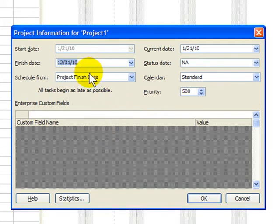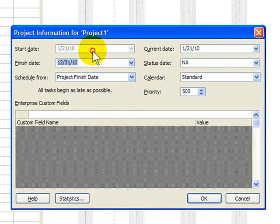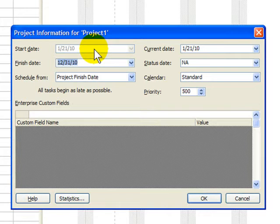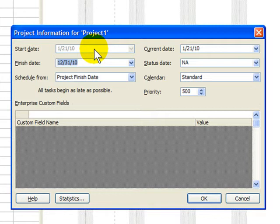Once you've chosen project finish date, you cannot input the project start date. But some people like to think backwards. The difficulty with this decision is that when you do that, every task will not start as soon as possible. Every task will start as late as possible. In effect, it will push all my tasks to the end of the year.